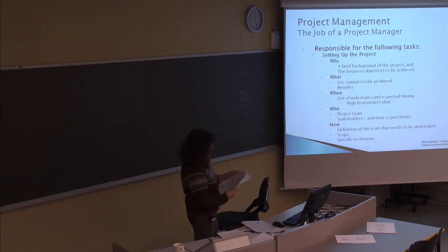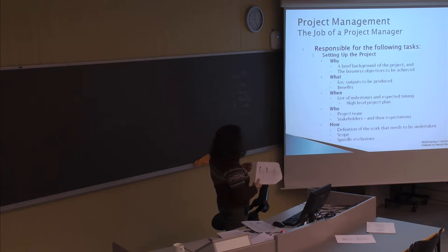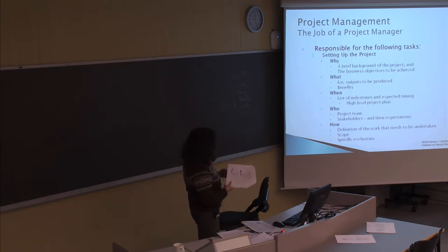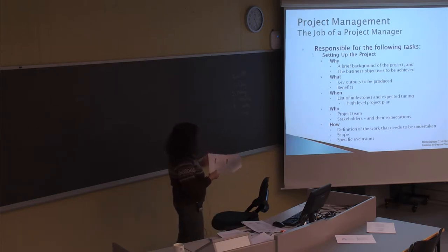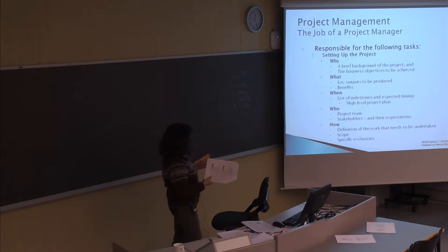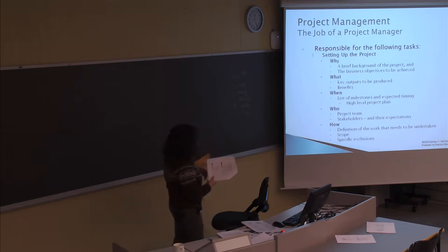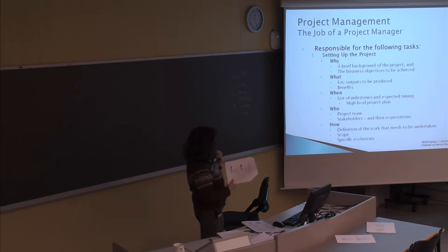In the first phase of initiating the project, you need to look at who is responsible for doing what, what are the basic goals and milestones, who's part of the project team, and what is the scope. This is an important stage because it identifies the scope of the project, who's involved, and the communication that has to take place. We identify those involved as the project team but also the extended group of stakeholders — people involved because their needs and expectations must be addressed.